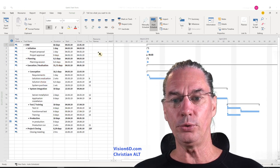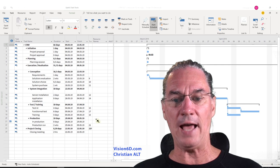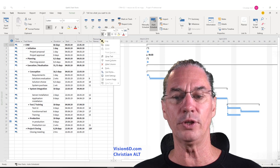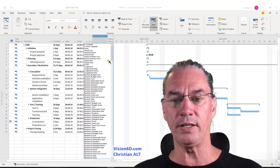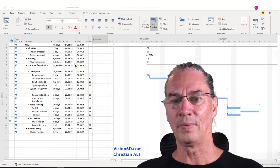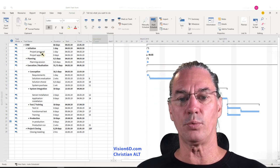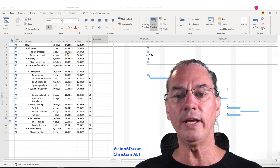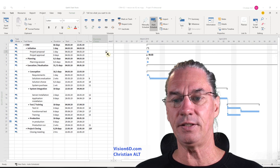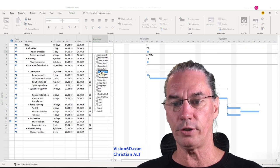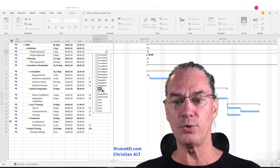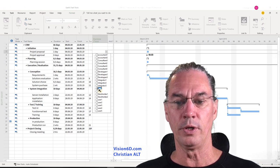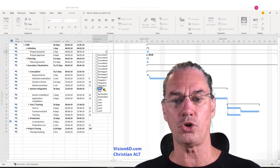So what we will do here is add resources. To add resources we need the resource column. If you don't have it, right-click, insert, and you will add the resource column. The initiation starts with the project proposal — this is proposing what we are going to do in the project. For this I need the project manager. You see here I have two project managers, PM1 and PM2, and I decide that PM1 will be in charge.